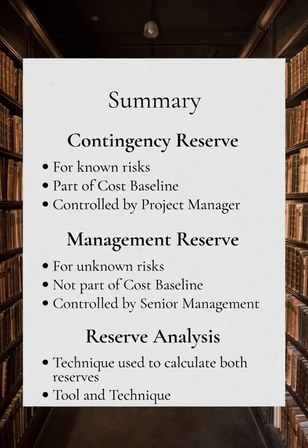And finally, 3. Reserve analysis, a tool and technique used to decide how much extra time or money should be set aside for known risks, such as those in the contingency reserve, and unknown risks, like those in the management reserve. Remember, contingency is for the risks you know about. Management is for the ones you don't. Reserve analysis is how you figure out how much of each you need. That's it for today's lesson on contingency reserve, management reserve, and reserve analysis.